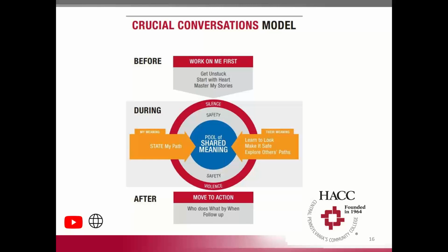And after, same thing, move to action. Who does what by when? My boss, Bill Sorrentino, did some consulting for PSMJ and wrote this cool little article about what we call our bye-bye list. When we do meetings, at the end, even if Bill's not in charge of them, he'll speak up and say, hey, we're going to do bye-byes. Bye-bye is by whom and by when. This hyperlink takes you to Bill's article. It's a neat way, even during a very busy meeting, to close it and make sure you move to action.